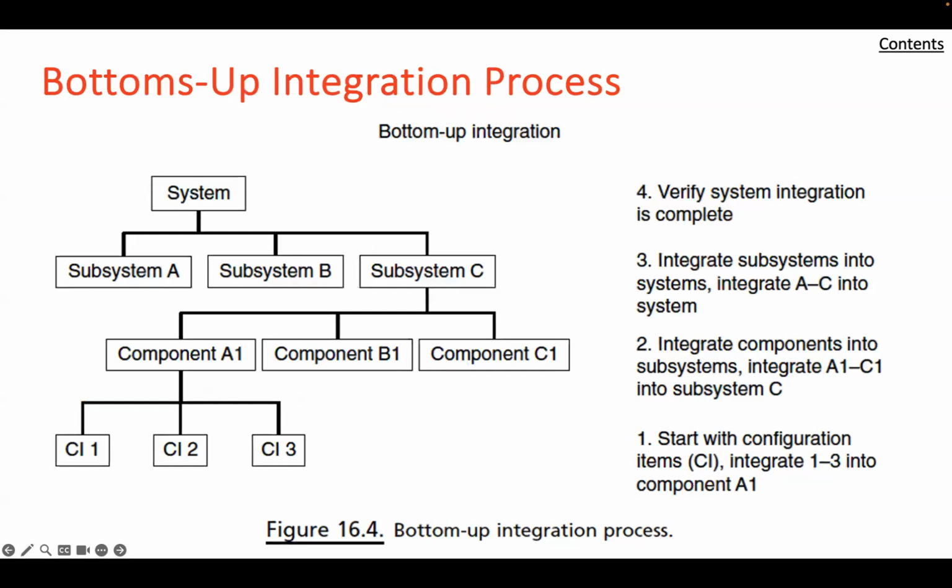This approach is much like many of the systems engineering textbooks teach. Each of the design configuration items is aggregated and integrated into components. Groups of these components are then integrated into subsystems, which in turn are integrated into the top-level system. This can follow a methodical approach to ensure that all elements of the system are accounted for, and rework can be performed until the successive level is satisfactorily constructed and integrated.